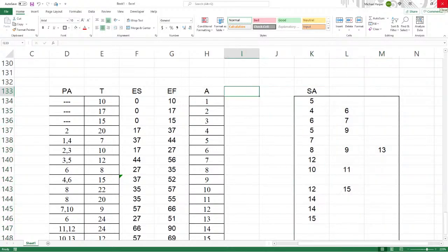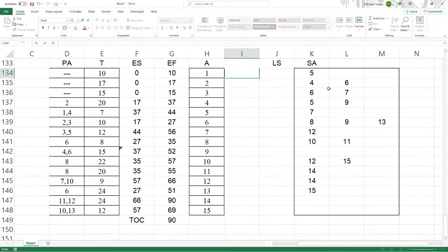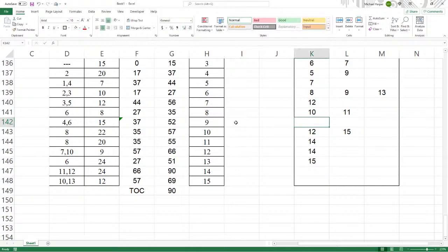And I'm going to have a late finish here and a late start here. Okay. We start with late finish where there's no successors right here. So the late finish equals the time of completion, which is 90, if there's no successor. So that's equal to 90.